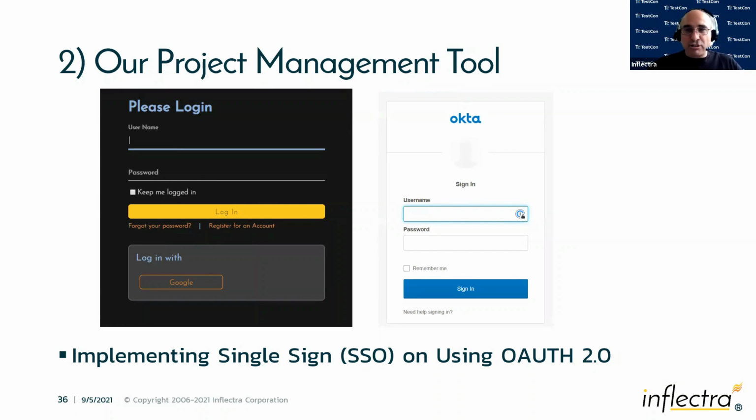And in retrospect, if you actually look technically at the architecture, the single sign-on was not being implemented as a shared service. Because of our lessons learned on the development side, we were implementing it as a standalone login feature, so once you were logged into the app, most of the shared services worked the same way. So we ended up overestimating what it would take, which isn't a bad thing, but it meant we probably spent more time doing some testing we didn't need to do. We could have focused on other aspects of the application release. In this case, I think we overlearned the lesson previously and didn't look critically at the architecture.